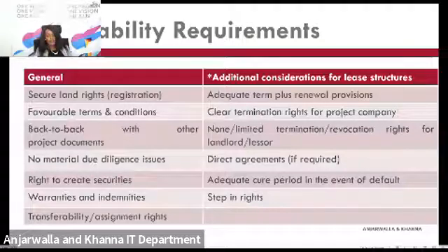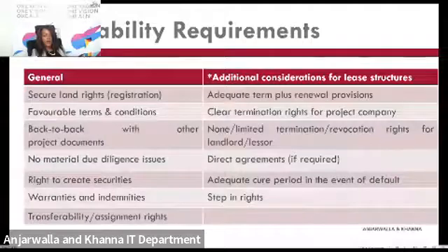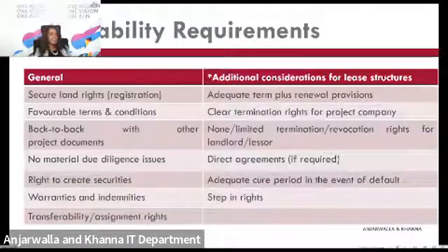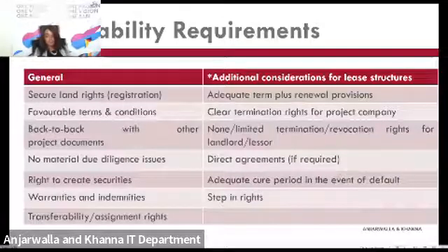Then there should be adequate cure periods in event of a default. So if there's a default by the project company, you'd want to have an adequate cure period, because if the cure period is too short, then it's likely that the land rights could be terminated, and that will be detrimental to the project.